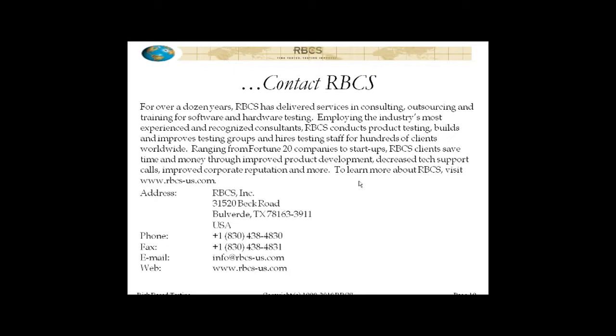Now, that's going to cause you to reevaluate prioritization and sequencing of the tests and so forth, and possibly triage. You also want to look at the issues of effort allocation, because it might be that by reprioritization of the risks, you discover that you need to add some tests in a particular area, in which case fine, or that there are some tests that you created already for a particular area, or maybe you haven't created them yet but you're going to create them, that you don't need because the risk isn't sufficiently high.